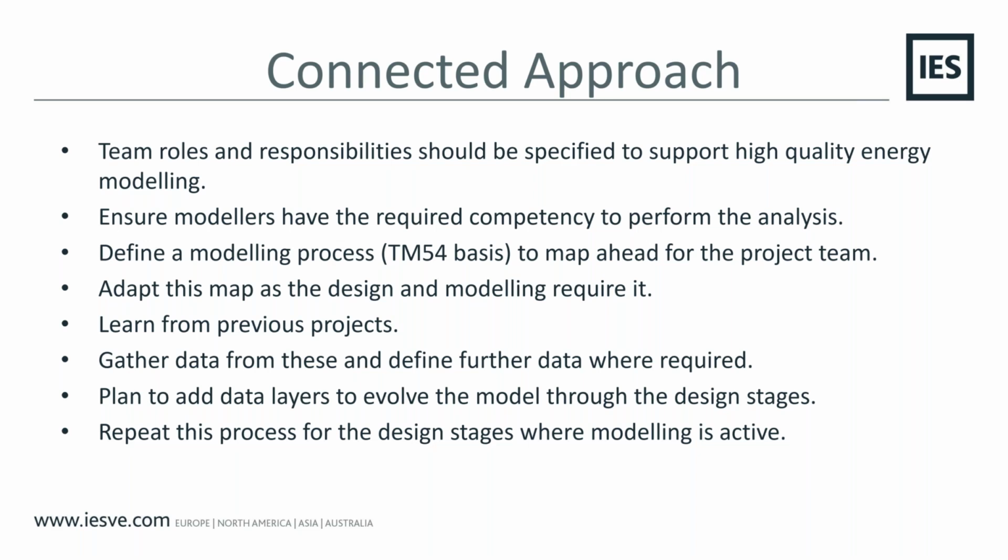It's not always the case that the data is available right from the start. So that's something that can be fitted into the map: what data do we have available now, and what length of time and source are we going to bring the additional data from that we need to start to layer up our energy model as we go through into the later design stages. And it's a case then of repeating that process as you go through and building up those layers to reach a point where you've got a more detailed energy model.